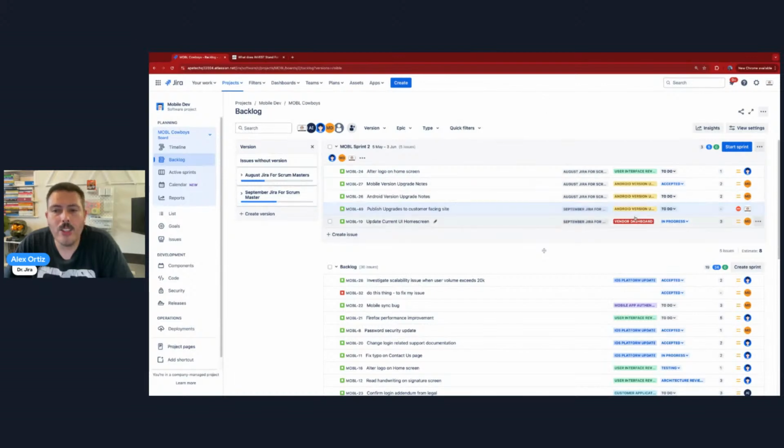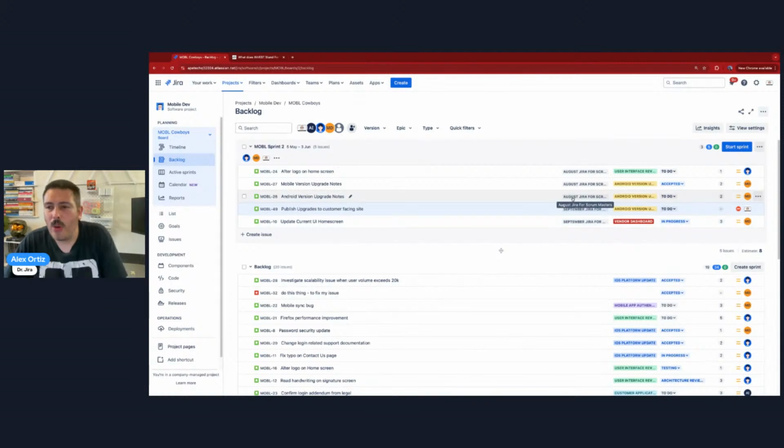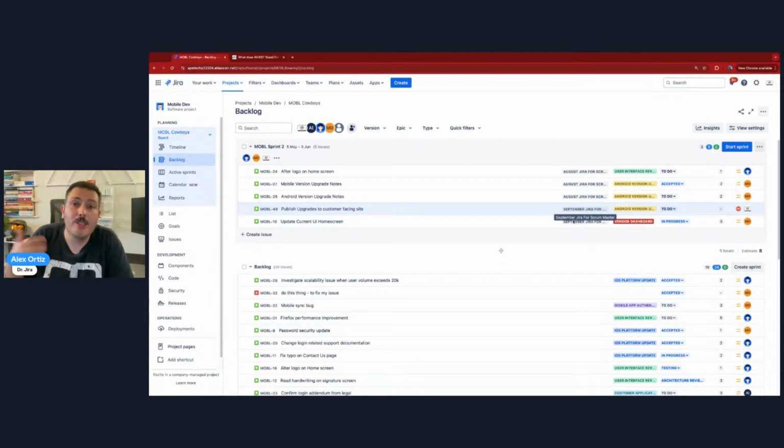Now when you are leveraging your epics and your releases in unison, check this out. We can now have educated conversations with our team and go, hey team, these two items belong to epics that are high in the priority list, but their release is much farther down in the future. Does it make sense to spend energy, developer hours, calories, effort, time on something that's due 30 days out?